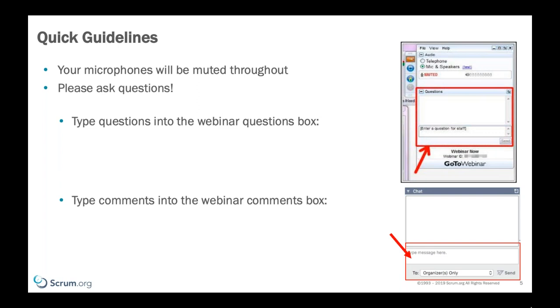So if you can get feedback from stakeholders in that review, and then in 2 weeks, invite them back to see the outcome of that feedback, i.e. what you changed based on it, then they're going to be engaged. Yes, if I provide feedback, it actually makes a difference. So getting users to see that, and sometimes you're going to need to do things that are less important for the overall product or overall value from the product owner's perspective, but it gets a stakeholder engaged in the process so that as you move forward with the important stuff, that stakeholder remains engaged and starts giving you feedback on those things.